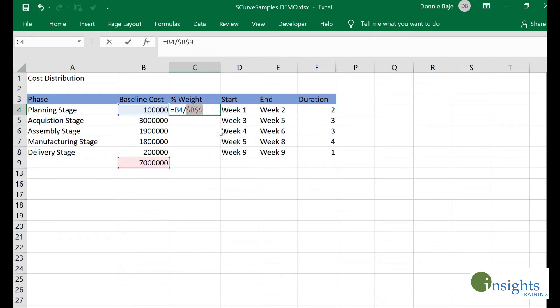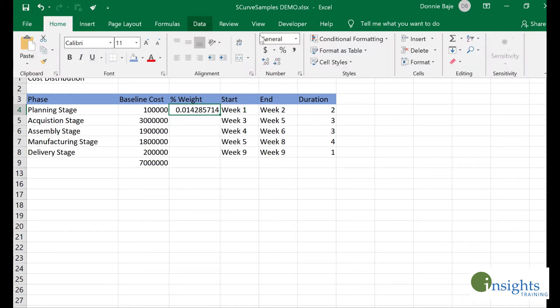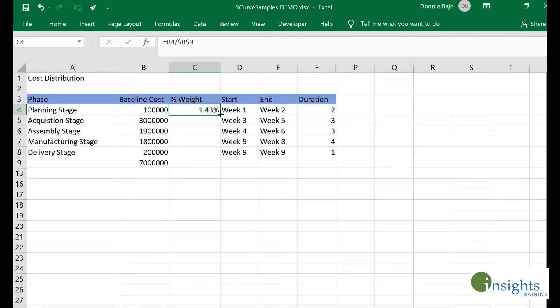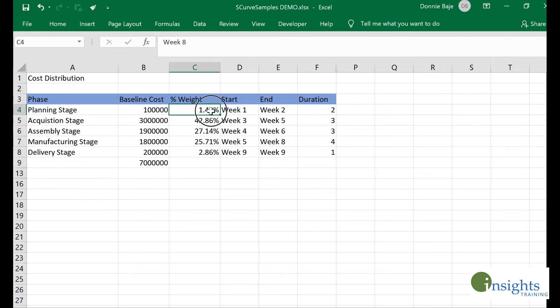I will make the denominator, the seven million, absolute by using F4 or by manually putting dollar signs, leaving the numerator as a relative cell with no need to lock. I'll format it as percentage and maybe increase the decimal, then drag this down to see how much percentage of the budget is going to be used by each stage.